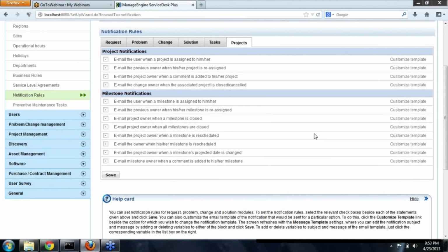So someone asked saying that we'll have to manually update the percentage completion of the project. So is it possible to automate this? Okay, percentage of completion for projects will be calculated based on the completion of the tasks and milestones. However, percentage of completion within a task has to be manually updated. So it has to be a value within 1 to 100, and it has to be updated manually for a task.